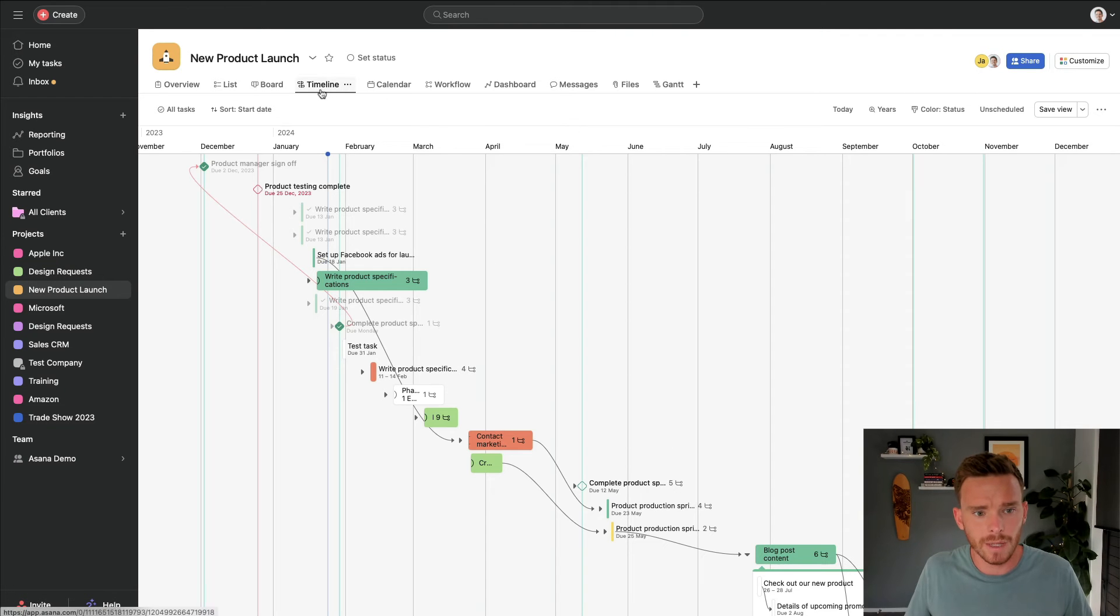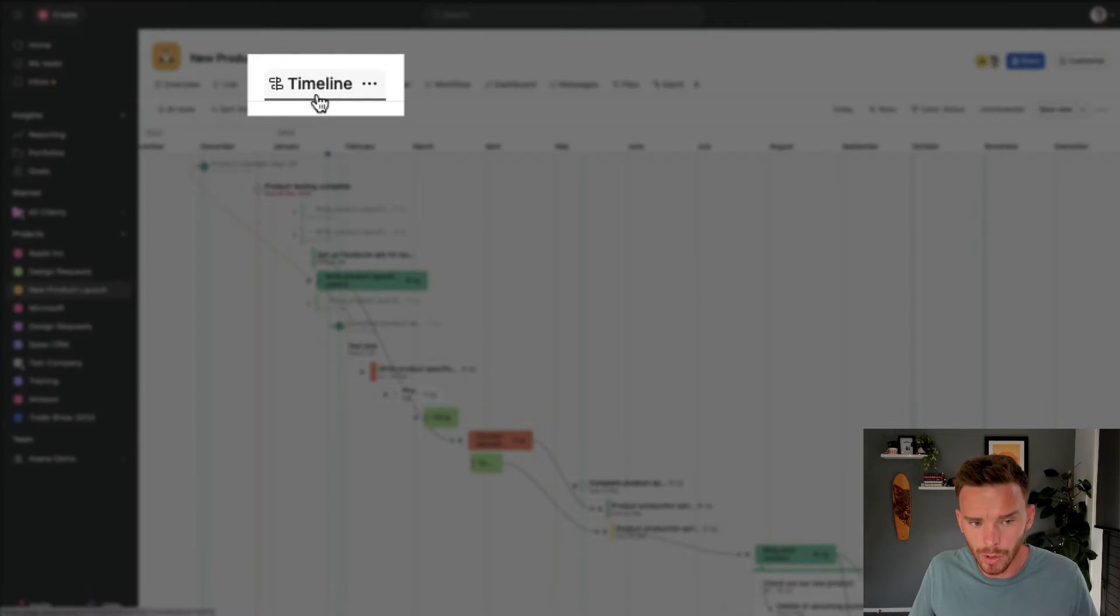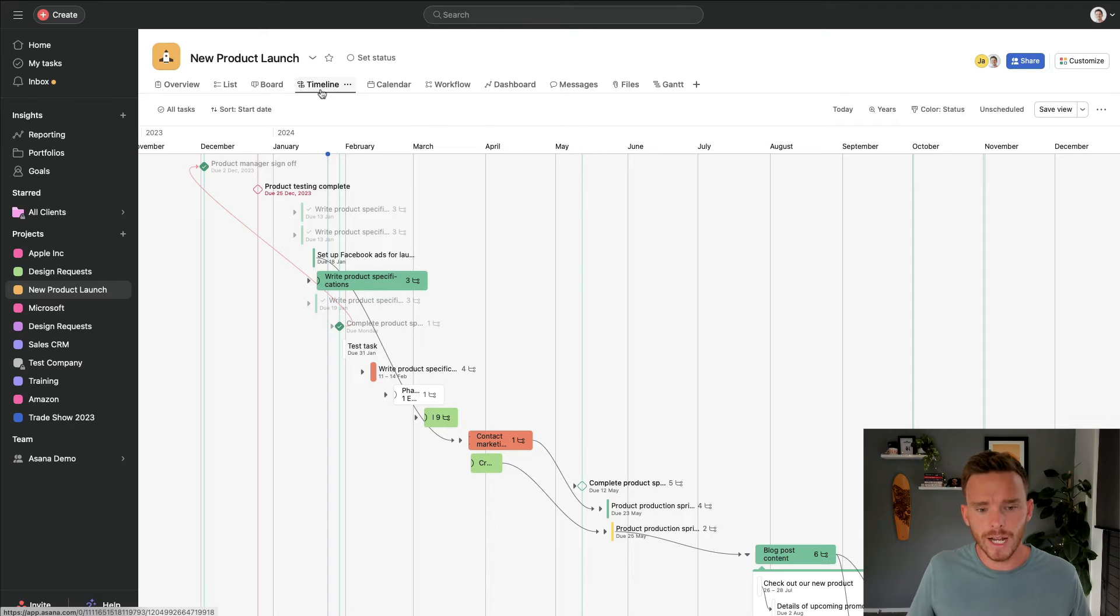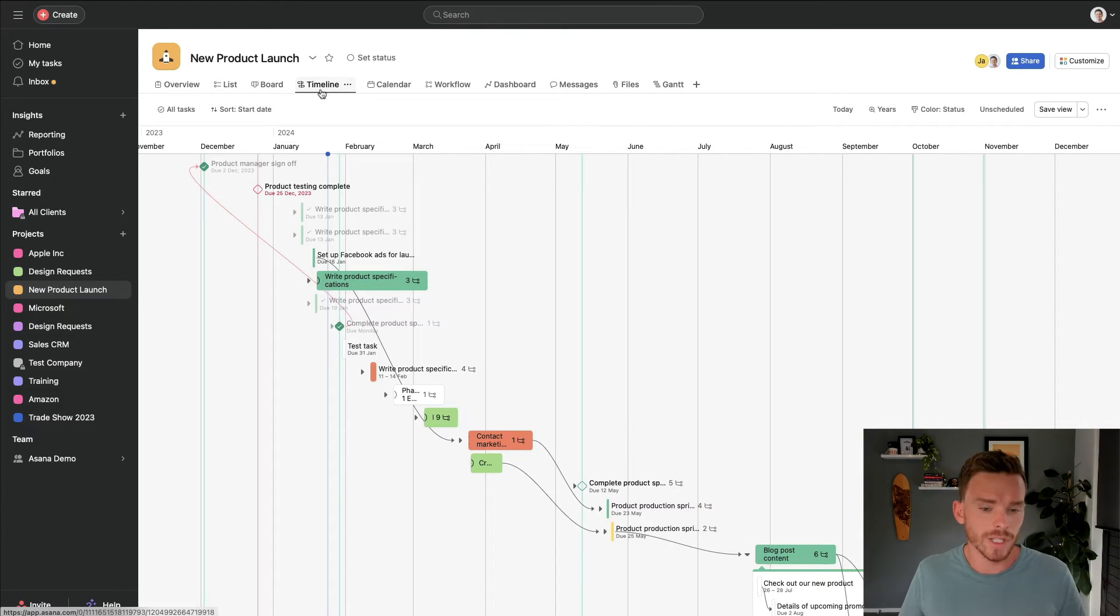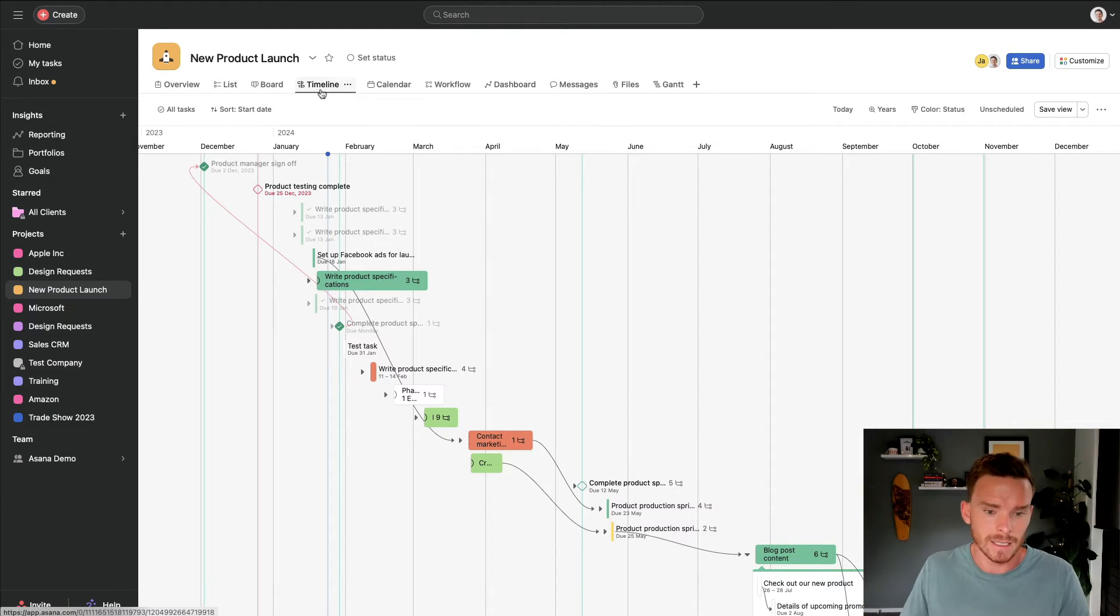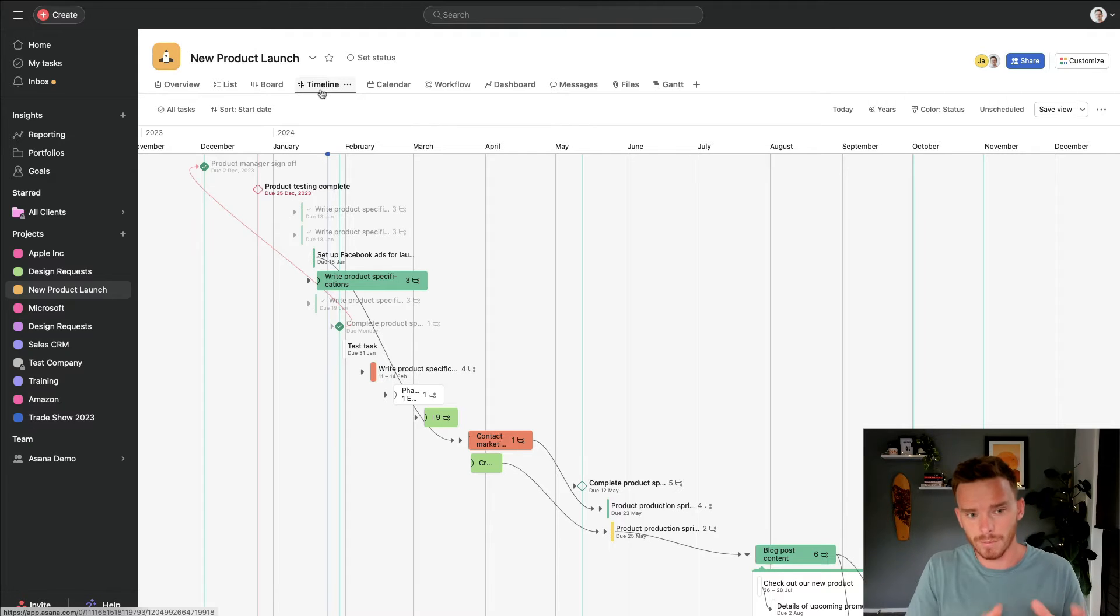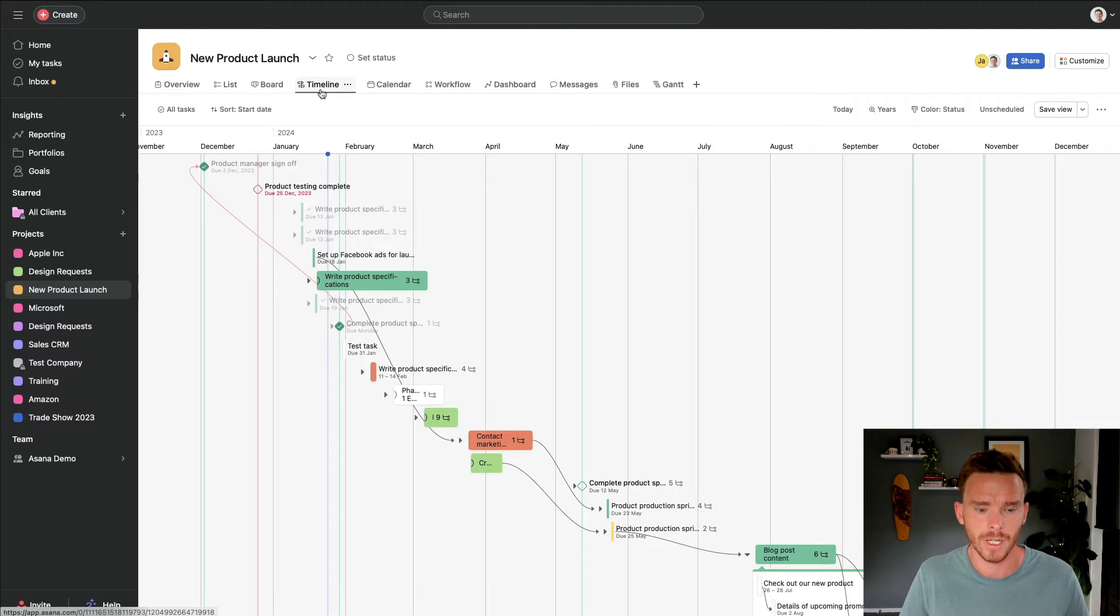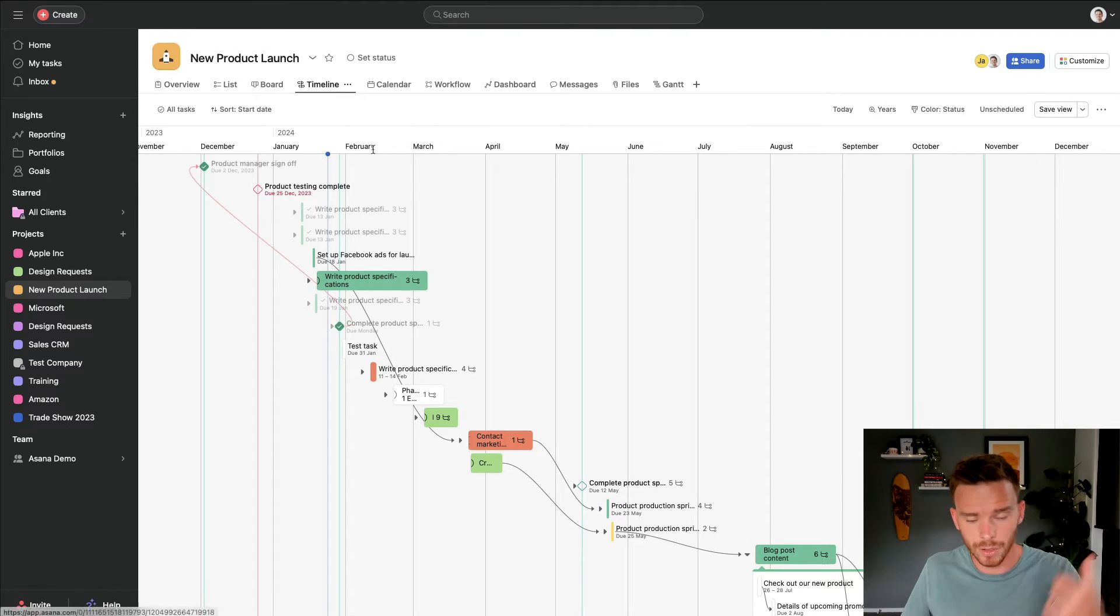Next up, we have the timeline view. I find the timeline view works really well for projects where you are working backwards from some kind of end date, or you're working forwards from some kind of start date, and the tasks need to happen in a particular order.